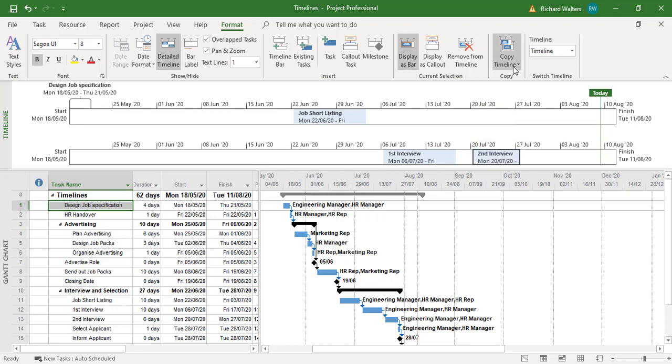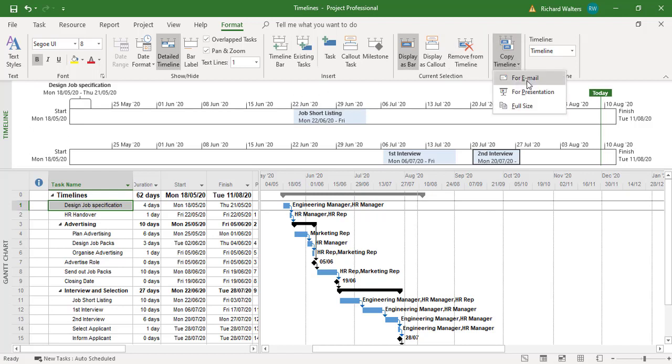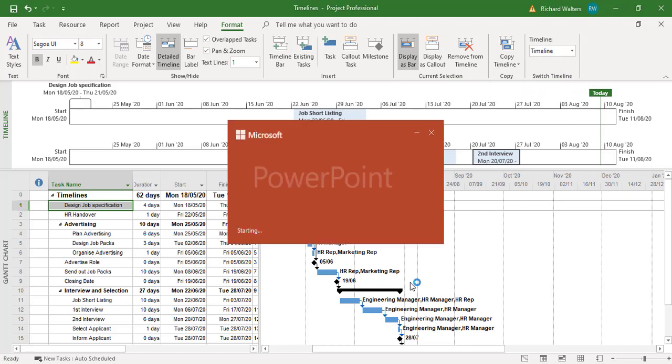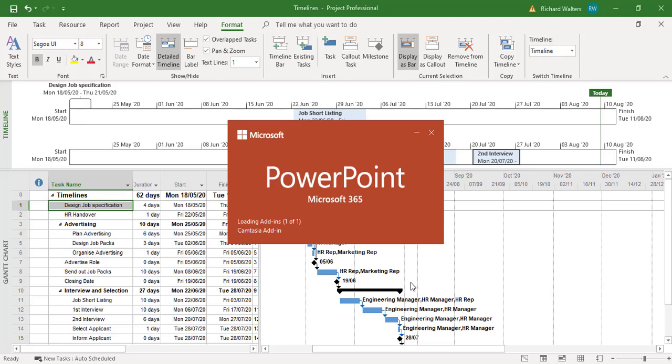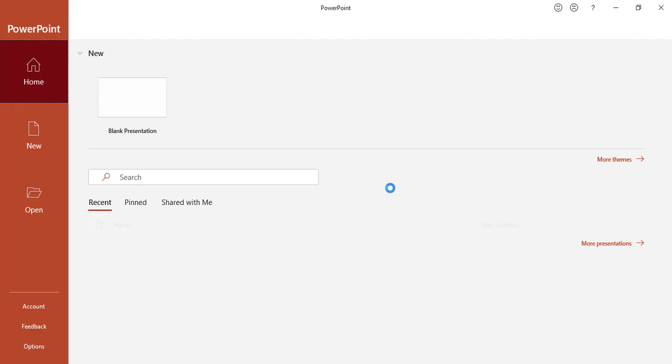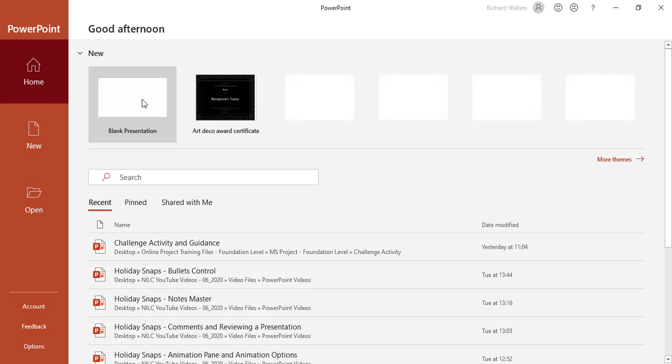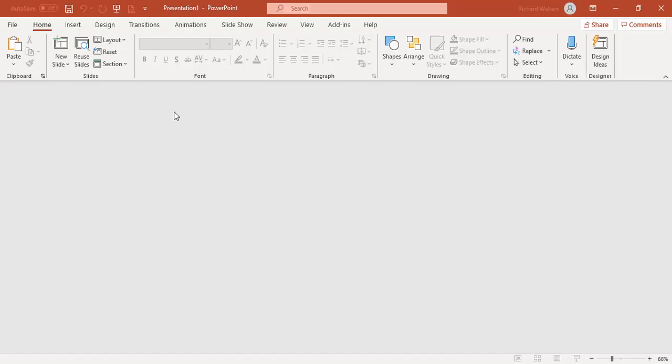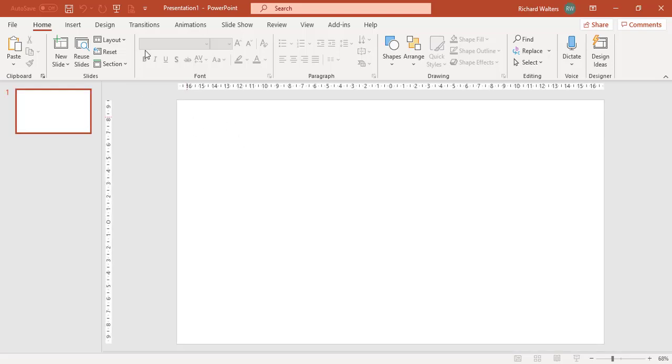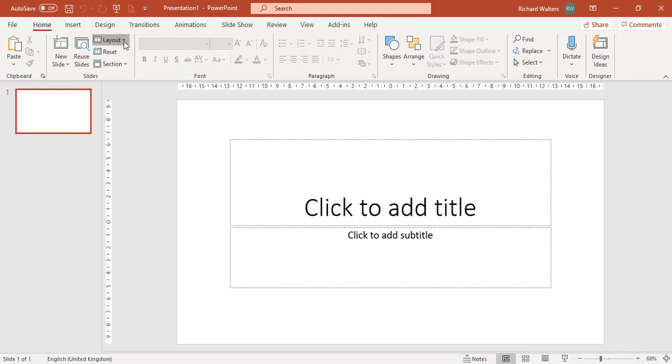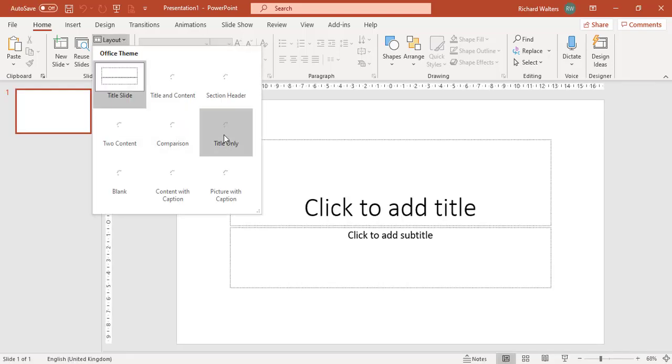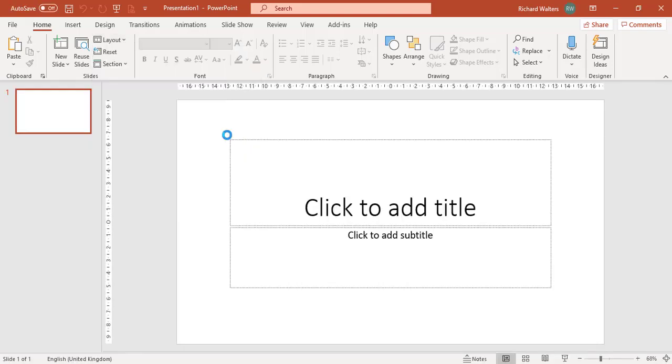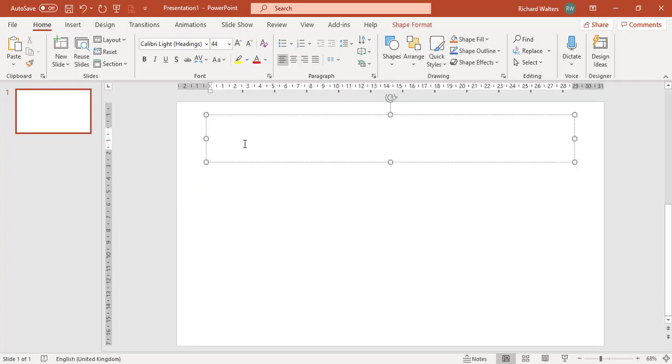So I can copy this whole timeline. So here's the timeline here. When it copies, it copies whatever's in the timeline. So I can copy timeline for presentation. Open up PowerPoint. And then I can paste it into PowerPoint when PowerPoint launches. So I'm going to a blank presentation.